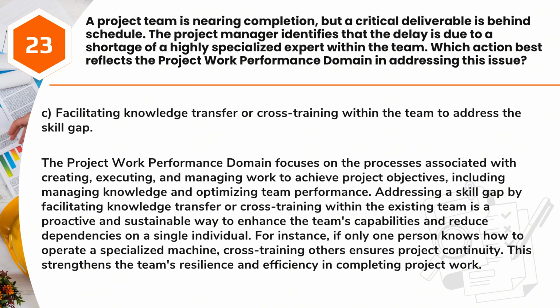Addressing a skill gap by facilitating knowledge transfer or cross-training within the existing team is a proactive and sustainable way to enhance the team's capabilities and reduce dependencies on a single individual. For instance, if only one person knows how to operate a specialized machine, cross-training others ensures project continuity. This strengthens the team's resilience and efficiency in completing project work.